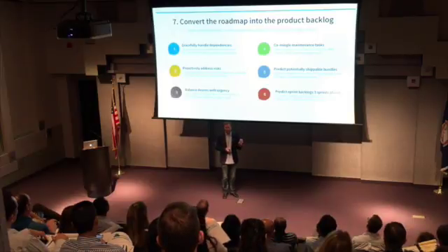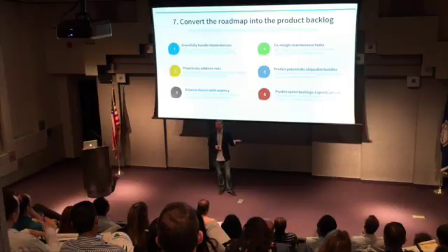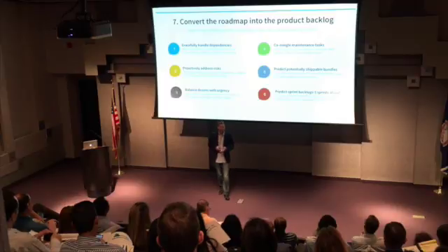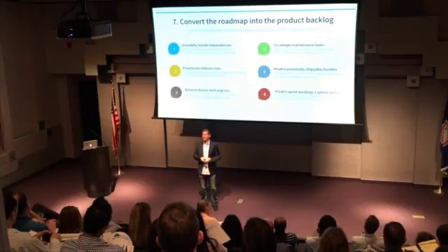So there's this other category of things that don't fall neatly into this process that I'm defining. It's not to say that you don't do them. It's that what I talked about is about 70% of your code. Maybe the next 20% is maintenance-related items. And the last 10% is this third bucket of delighters. Those things that your customers never asked for, but once you deliver them, they're like, oh wow, that's great, that's really neat.